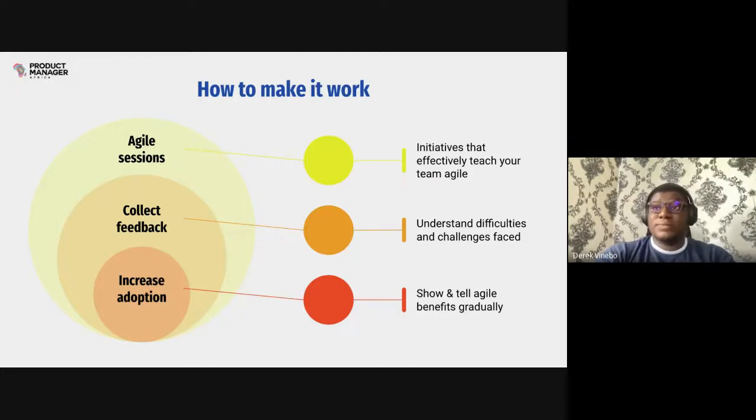Once you can do that, you're meant to set up different meetings, not one meeting, but different meetings in different sub teams to actually teach them gradually how to use Agile and the slight changes they can actually make to their current process. So if they had stand-ups for, let's say, 1 hour, how can you come back now and say, okay, you know what, stand-up should be shorter, and this is why. Instead of having a long discussion on the call about something that went wrong yesterday, why don't we have a shorter stand-up and then move that other conversation to a different call, so we can have a more productive meeting, right?